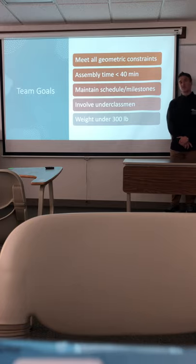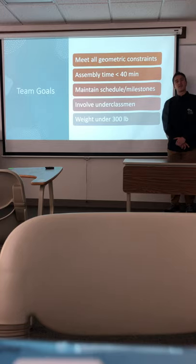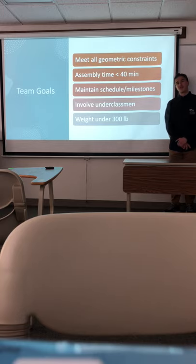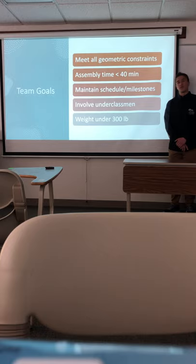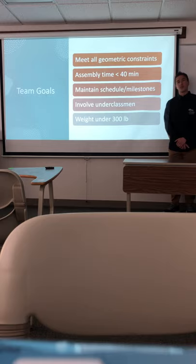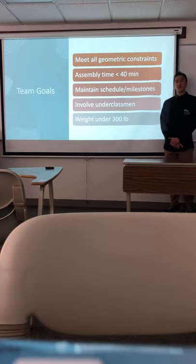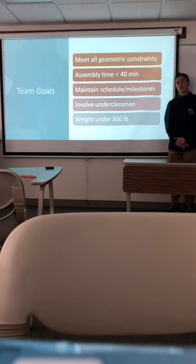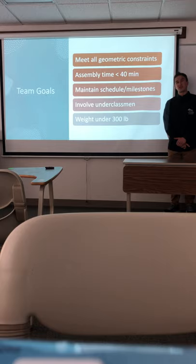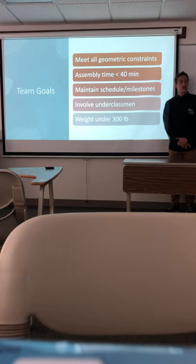Additionally, from a project management perspective, we laid out a number of tasks and milestones initially, and we wanted to hit those in stride pretty well. We ended up doing this pretty well. The milestones were pretty generic, but we had over 70 tasks laid out total that we had to try to hit, and we broke those down into a schedule, into a workflow diagram to make sure we knew where to be, what we needed to do, what tasks we could do at the same time, and that was our goal there.